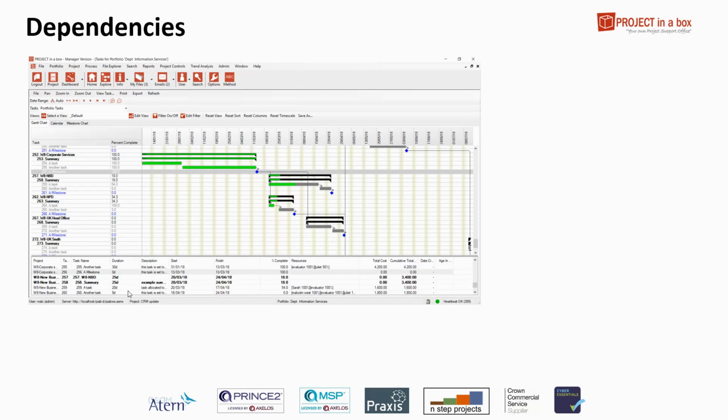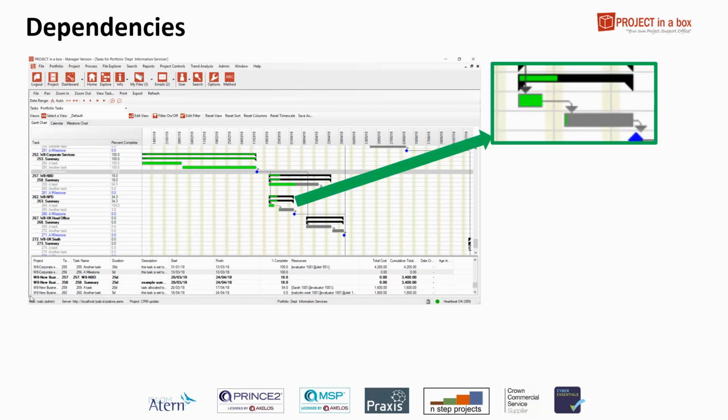Dependencies are obviously very important, and dependencies, like I say, are normally managed within the source plan file. So we've got some examples of that here. This is a plan file. It's come from Planner. You can therefore see the dependencies showing, but those dependencies were set within the Planner file and used to schedule those tasks when they started and finished, perhaps. And as I say, you can see those displayed here, but these are within a particular project plan.